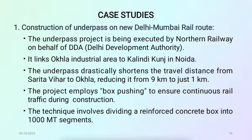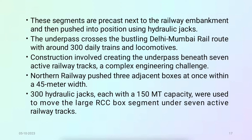Moving on to case studies — Construction of underpass on the New Delhi–Mumbai rail route. The underpass project is being executed by Northern Railway on behalf of Delhi Development Authority. It links the Okhla industrial area to Kalindi Kunj in Noida, drastically shortening the travel distance from Sarita Vihar to Okhla from 9 km to just 1 km. The project employs box pushing to ensure continuous rail traffic during construction, involving dividing a reinforced concrete box into segments of 1000 metric ton each, precast next to the railway embankment and pushed into position using hydraulic jacks.